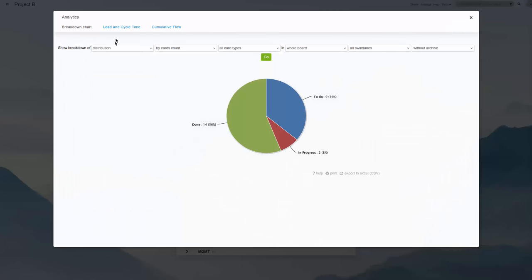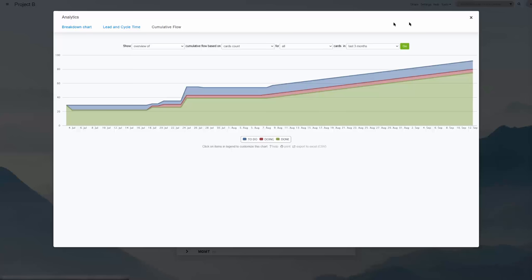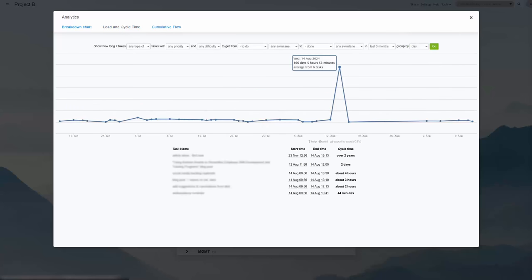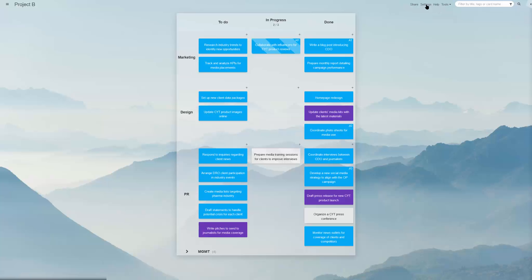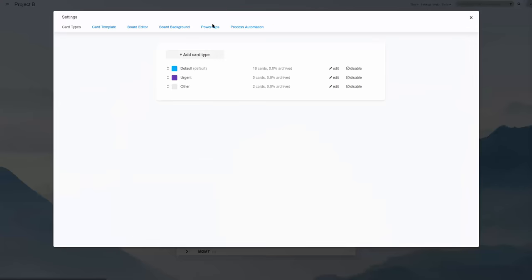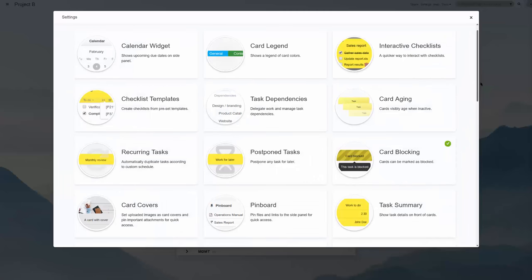They are a simple breakdown chart, a cumulative flow diagram, and a lead and cycle time graph. You can also export the board data itself to a spreadsheet to perform further analysis.